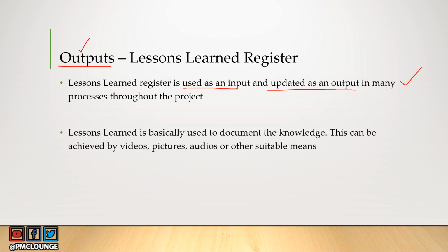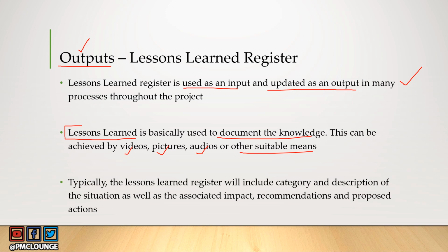Now, lessons learned is basically used to document the knowledge. This can be achieved by videos, pictures, audios, or any other suitable means. So you are basically documenting knowledge when you are generating this output of lessons learned. Typically, the lessons learned register will include category and description of the situation as well as the associated impact, recommendations, and proposed actions. So we are trying to include as much metadata for lessons learned as possible so that the context is not lost.